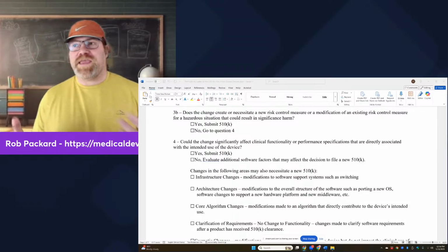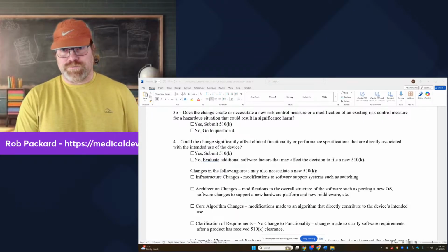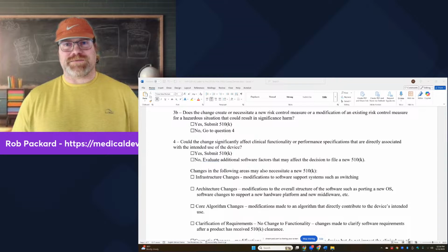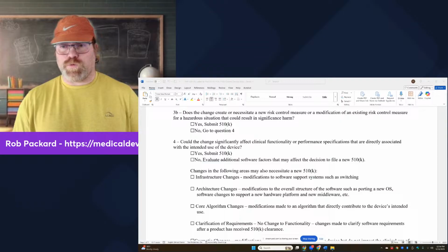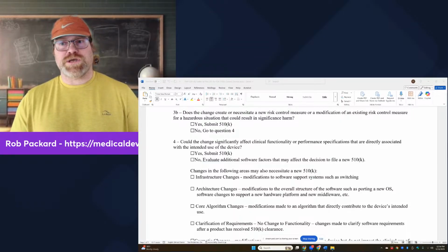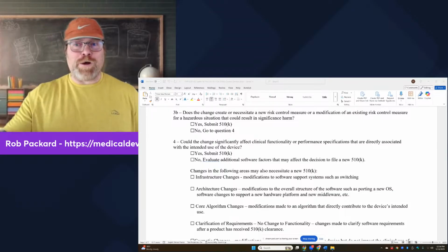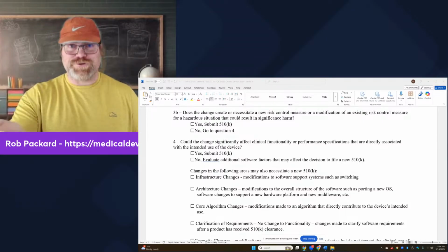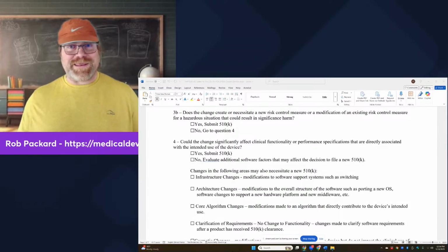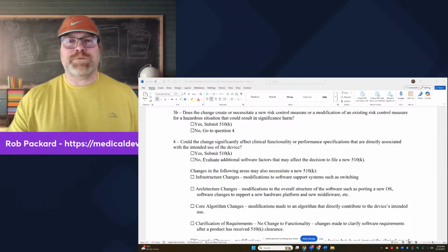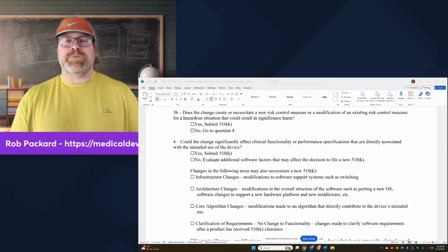And everybody's like, well, what if the FDA doesn't approve us? Honestly, in 510Ks, if you've done the testing you're supposed to do, you've got a 98, 99% chance of getting your 510K clearance first time through. That doesn't mean you won't get questions. It doesn't mean your submission won't be put on hold. It doesn't mean they won't ask you to change your instructions for use 10 times. That's not what I mean. I just mean the end outcome at the end of that 510K review will be, here's your clearance letter. So whether it took you 60 days and no questions, or it took you 180 days and a ton of questions, the outcome's the same. You got your clearance. So plan accordingly. I mean, we all want it early, but plan accordingly.